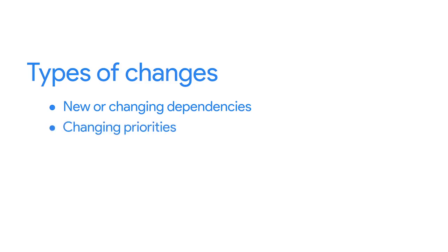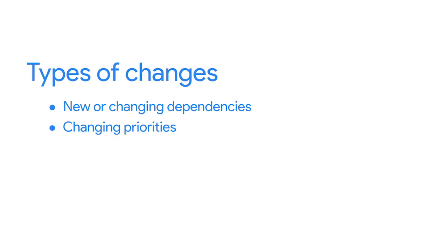Next is changing priorities. The scope of the remodel changes if your client's in-laws suddenly have to move in, and you have to move up planned work on the spare bedroom before completing the bathroom remodel. Next up, the capacity and people available could change. Maybe you have to replace the plumber because you had issues on the job site.